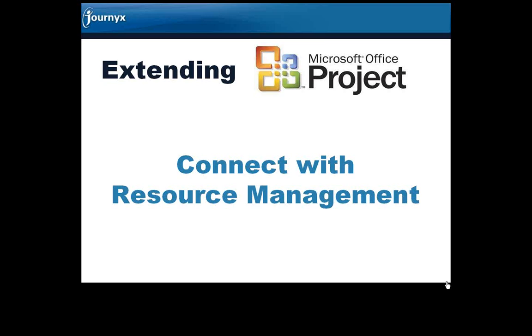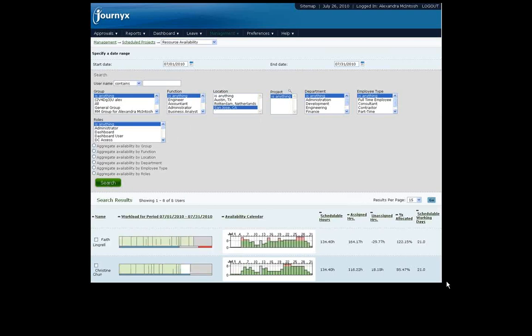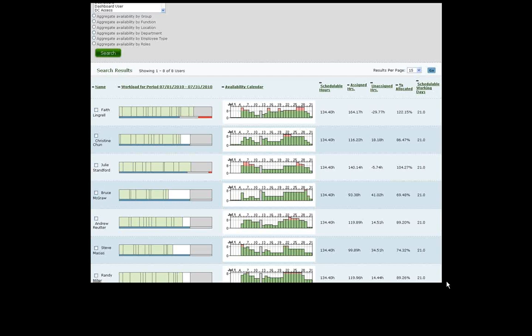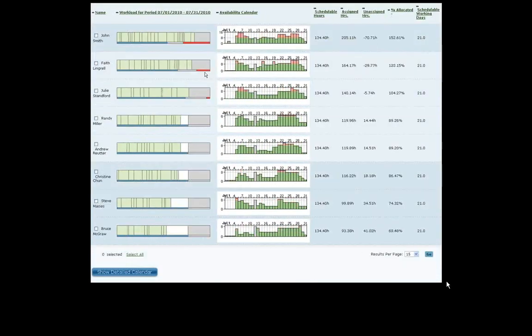Project managers need real-time access to team member schedules, their tasks, and available time in order to assign people to tasks more effectively. Microsoft Project will show you resource usage, but it's also incomplete or siloed, meaning it's not a complete picture. You need to have complete visibility and insight into resource availability, which means you need to be able to see not just what projects a person is working on, but also factor in organizational initiatives, their non-project work, overhead time, when they're on vacation or taking leave.